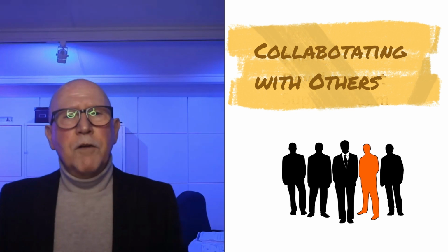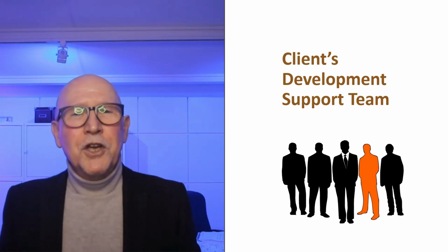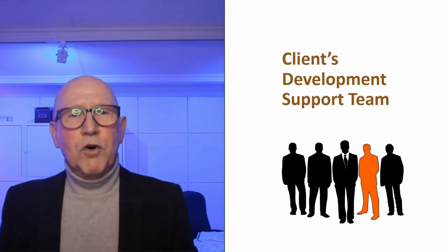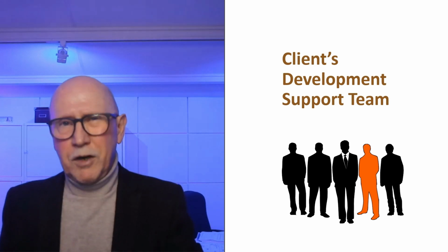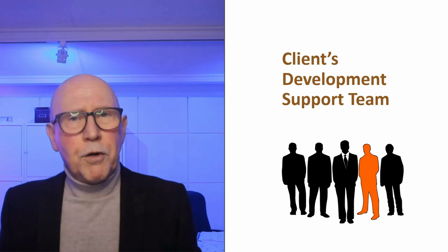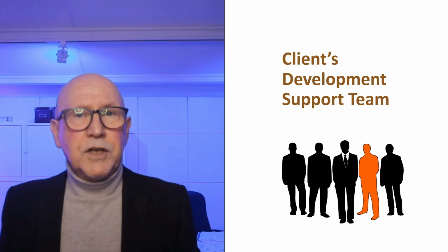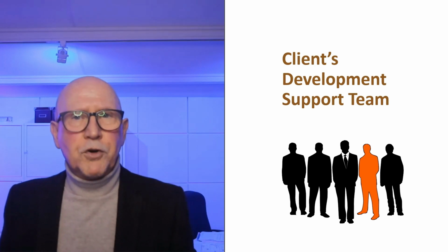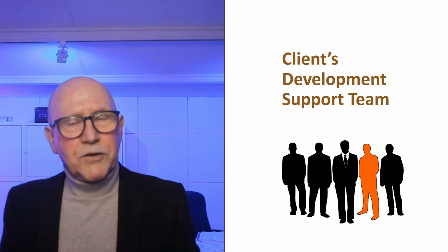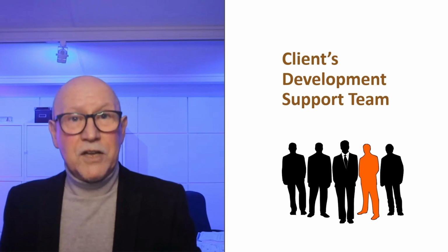For you as the architect, downstroke lead design consultant, your focus will be on matters relating to the overall design coordination of the building. I just mentioned that a few moments ago. And although there may be other activities or even design aspects about the development project that will overlap, your remit as the lead design consultant will be essentially to coordinate your architectural design, structural design, building services, and any other specialist design into the total design of the building. That's your responsibility, and this will require you to collaborate with others.